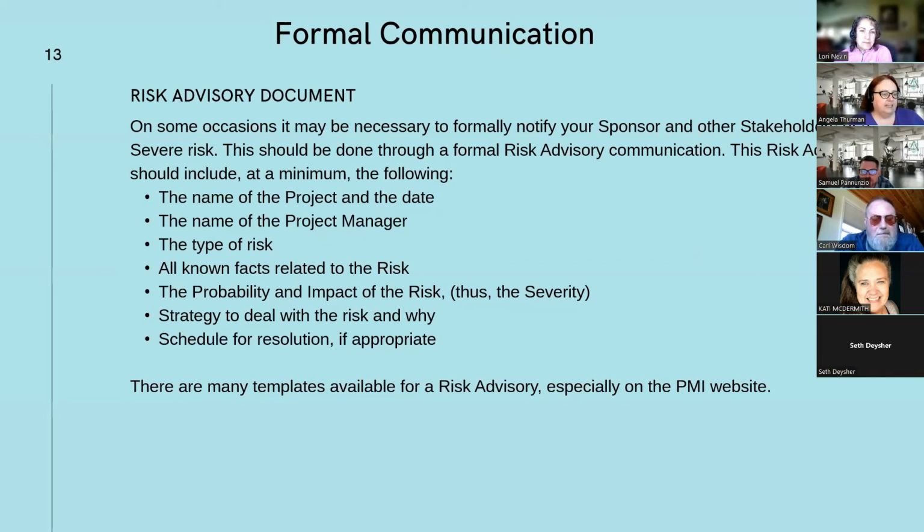But whatever template you use, it should contain at a minimum the name of the project and the date of the communication, the name of the project manager, the type of risk that you're describing, all of the facts that are related to the risk.